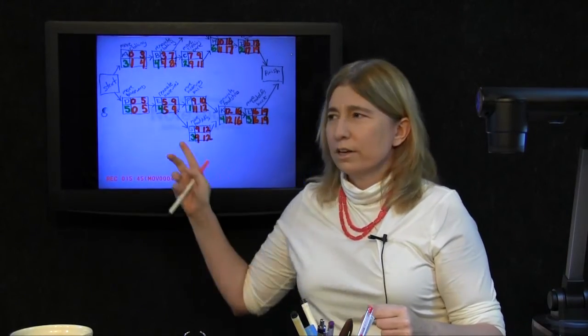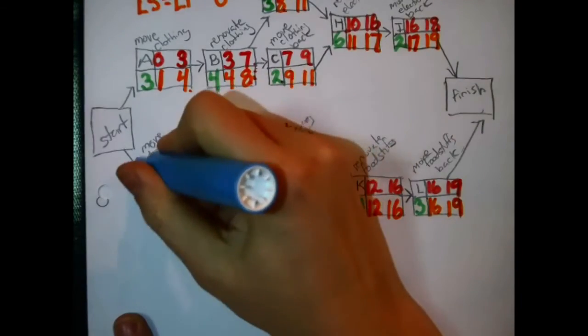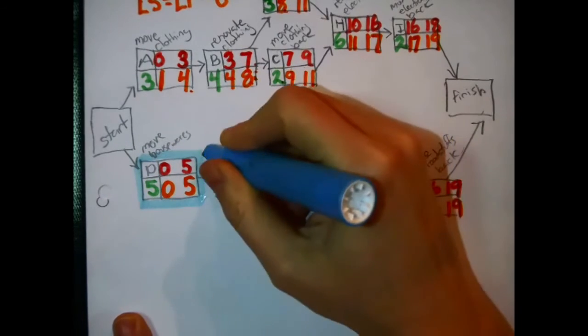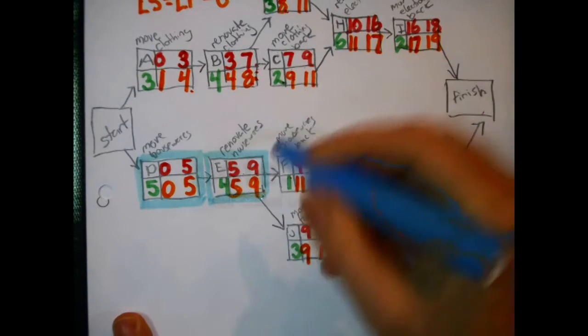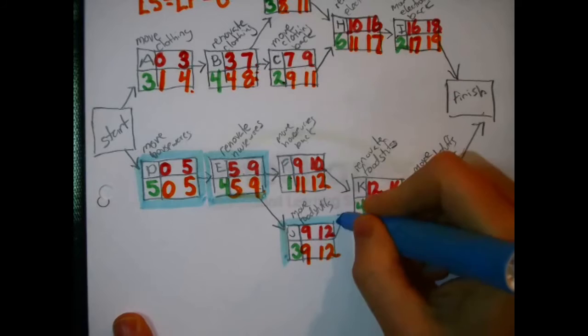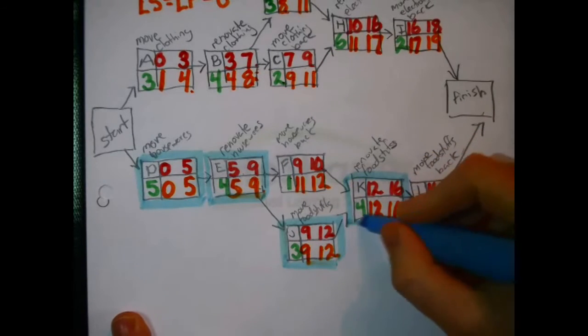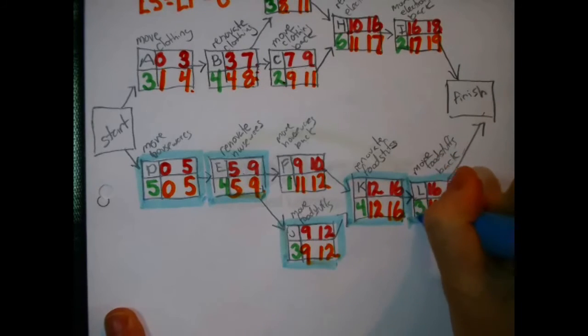Oh, which means that actually, since we're looking at the network with its timings, you can see the critical path, because the critical path activities are the ones in which the timing matches. Early start and early finish, late start and late finish are exactly the same set of numbers. You see it? It's all along and through here. I'm highlighting the activities in which early start, early finish, and late start, late finish are the same numbers.